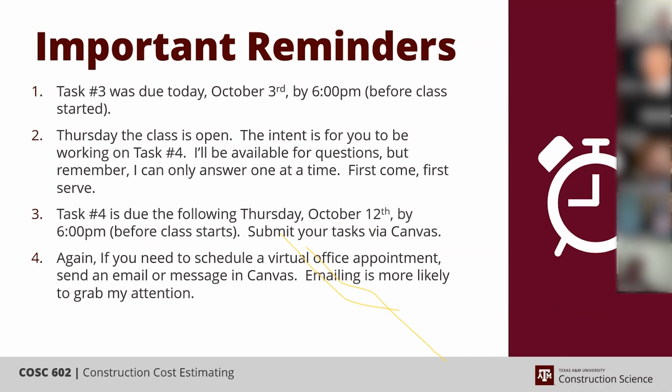No. If I were lump sum bidding this thing, yeah, we would, but we're not. This is an exercise to understand the principle, and so no, let's not worry about going that detailed. If you go all the way through, the 2 inches is not going to impact the essence of the number. But in this case, since it is threaded, that means it's going to be a field installed valve, and therefore you need to pick up your valve handling as well.